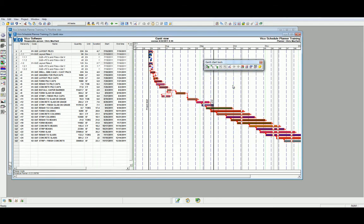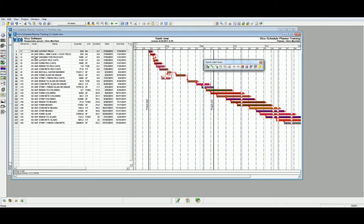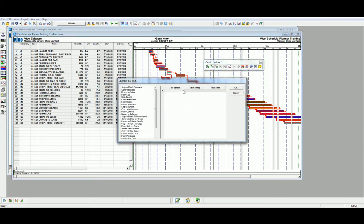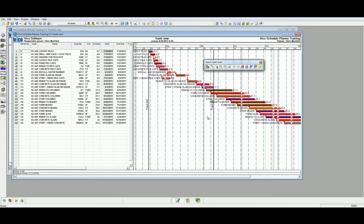As you can see, the sight lines which appear and depict the months have altered in the Gantt Chart View. We can use Control-A to select all the activities and using the Edit Bar Texts function, we can modify exactly what we show in the Gantt Chart View. In this instance, let's add the name of the activity and the duration. As you can see, we have also modified this in the Gantt Chart View.